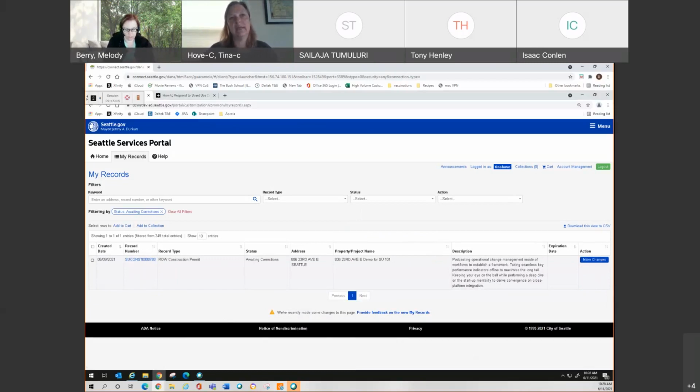This is really for amendments. This is for changes to, not only changes to issued permits, this is also where you will go to enable access if you want to add another contact. The good thing about enable access, and here's a little nugget of me going off script, enable access is automatically approved. So if you just need to give somebody access, go into make changes and do enable access. As long as that person has a portal account, it will be automatically approved and automatically given access to that permit.